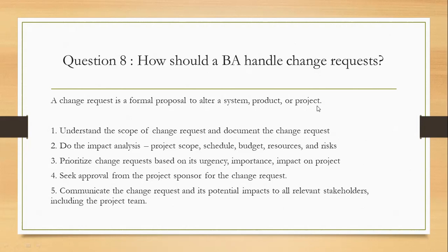If you are working on a project and the client gives any proposal to work on something, we need to consider it. We need to go through analysis related to the scope: how is that request impacting our project, how is it impacting our schedule, budget, and resources? Can we complete this in this project or not? We need to analyze and prioritize. We need to think about everything that request affects, and how it is affecting the health of our project.